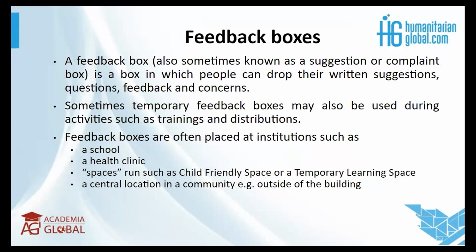So it's important, even before you set up these mechanisms, that you understand that this should be the routine that the MEAL staff, or the child safeguarding staff, are going to be following when opening these particular boxes. They should be able to access them at these times. And then you also have plans for when these people are on leave, or they may be going for certain breaks, such as maternity breaks, or maybe they have some study leave. There needs to be plans of who else is going to take up that particular duty, but essentially it should be one person as the custodian of the key of those feedback boxes.